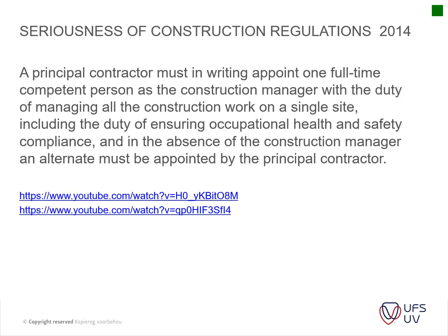Got the seriousness of the construction regulations. I just wanted to highlight this to you. A principal contractor must in writing appoint one full-time competent person as a construction manager with the duty of managing all construction work on a single site, including the duty of ensuring occupational health and safety compliance, and in the absence of the construction manager, an alternative must be appointed by the principal contractor.